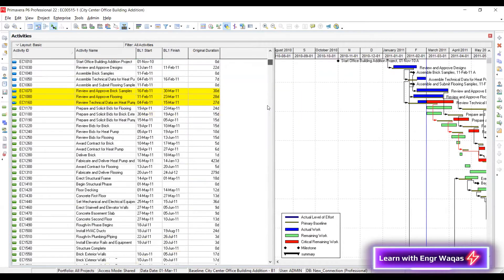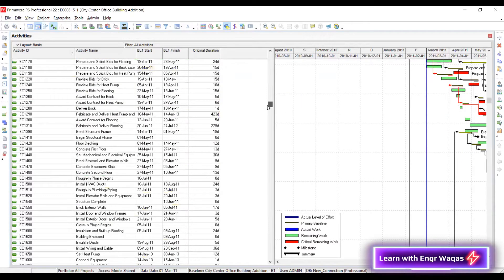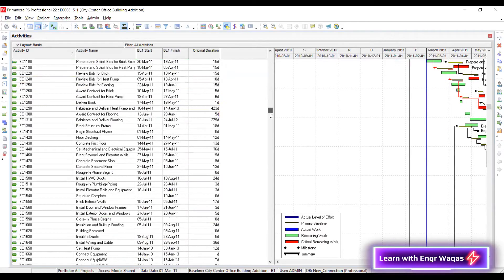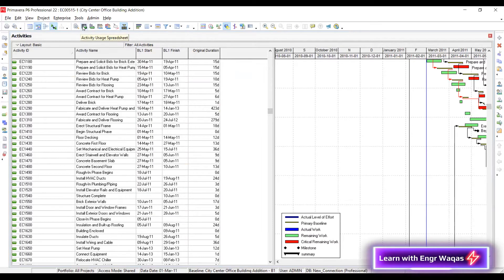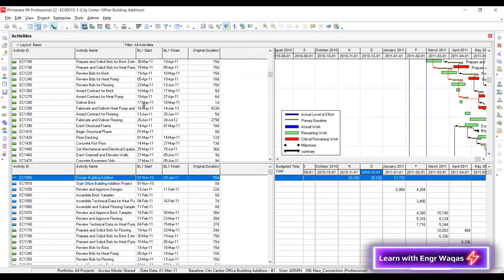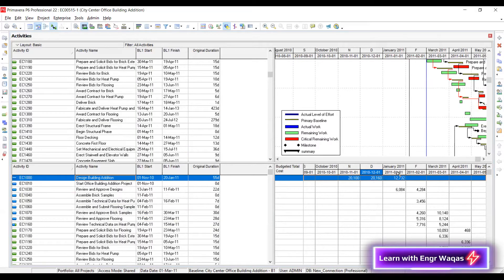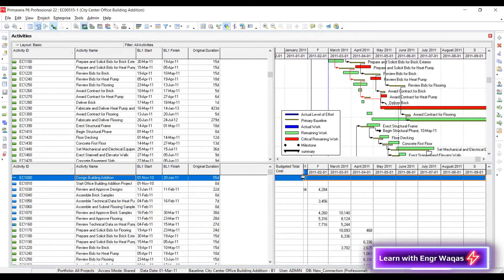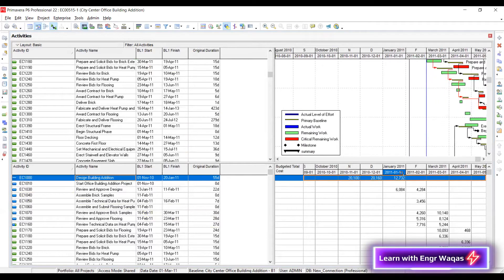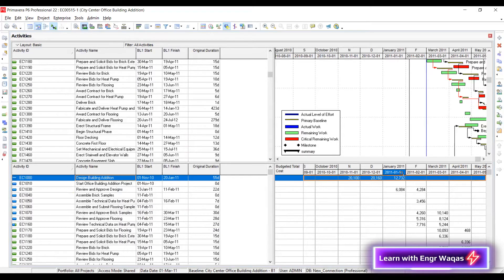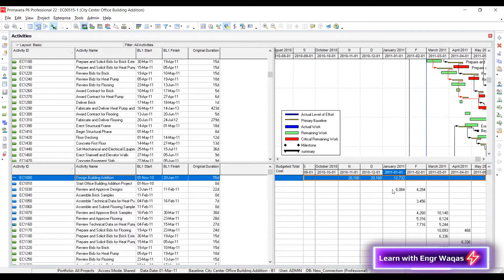Now the second step I have to apply is the usage of resource usage. Now activities, you use a spreadsheet. So here you can click on activity usage spreadsheet on top of your header. And once you click on that, you will be given a dropdown window which is explaining your project spreadsheet in terms of cost, whatever you want to show your S-curve, labor units, non-labor units, whatever you want. You have to select over here how to customize this window as per your requirement. I will show you.